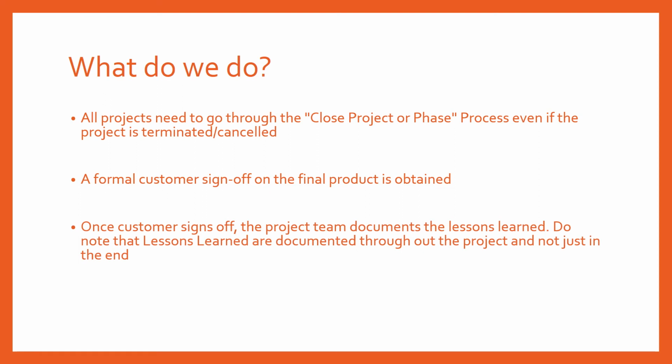And once the customer signs off, the project team documents the lessons learned, right? Remember the order here. You obtain the formal customer sign off first, and after that, you complete your lessons learned, because there could be potential lessons learned pointers from the customer sign off process itself, right? So that's why you first obtain the customer sign off.